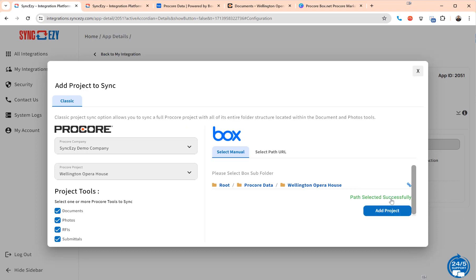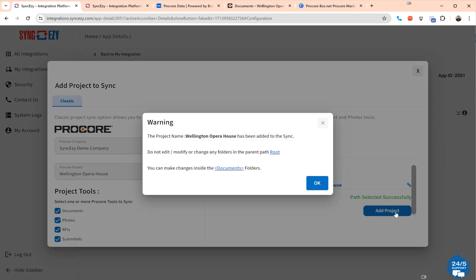But you basically select the project and then you select the path and then you add a project to sync. Remember that once you've added a project to sync you cannot change the parent path on the Box side.